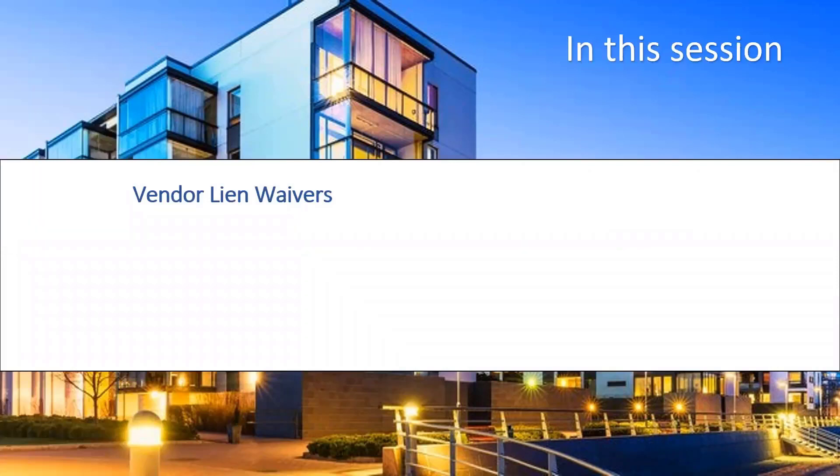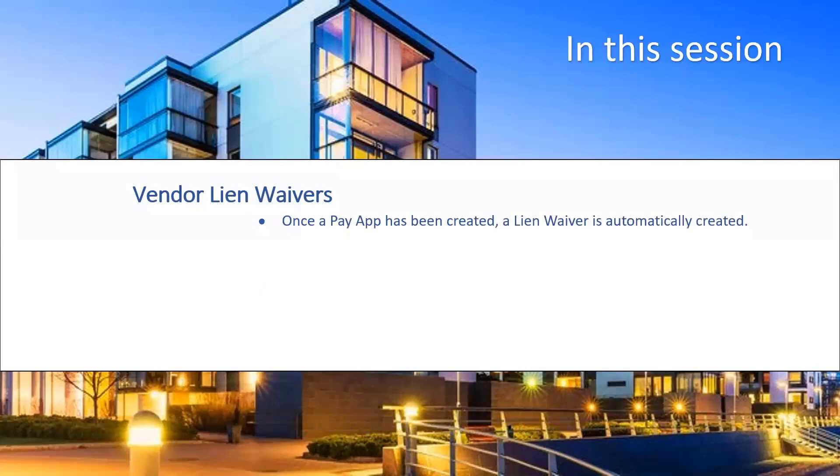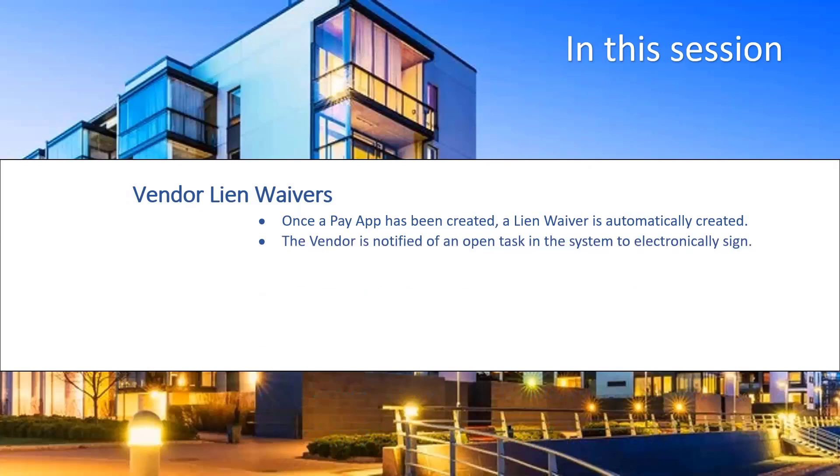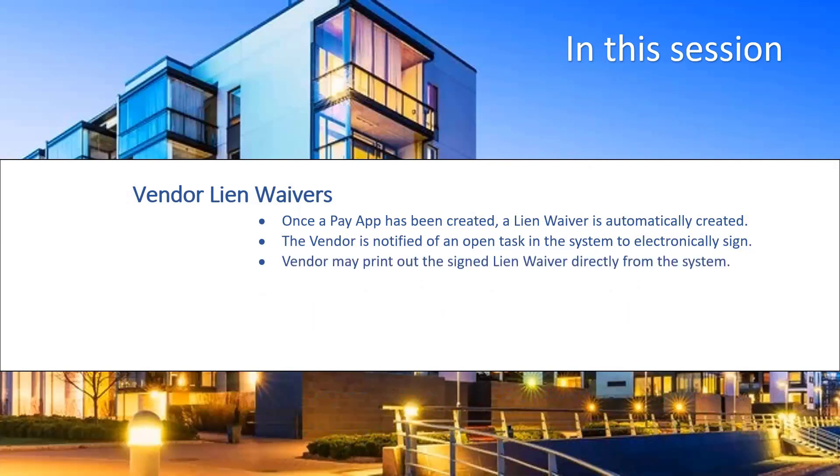In regard to vendor lien waivers, once a pay up has been created, a lien waiver is automatically created. The vendor is notified by email there is an open task ready for them to sign electronically. The vendor may print out the lien waiver directly from Eyebeam.